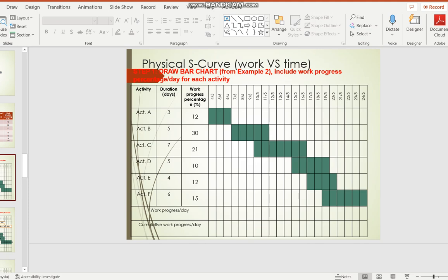Yeah. So then again, this 12%, you spread it out, 30% you spread it out. Like your Gantt chart I previously explained, you can put 4, 4, 4, but you must tell me what the 4 means. What does the 4 means? 4 means for activity A. If activity A is drainage work, for example, 1.8 km of drainage work, so month 1, I want to see 600 meters all done already. So that is 4%. You see, my drainage work is 12% out of the whole physical progress of the whole site. So this is what that 4% means.